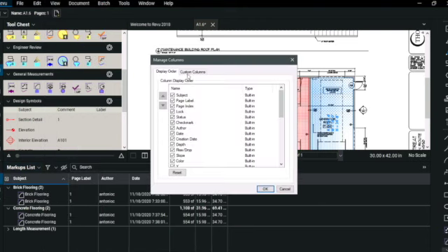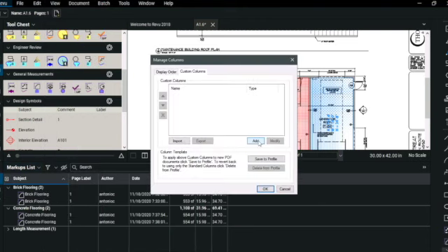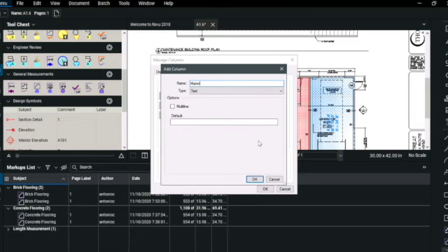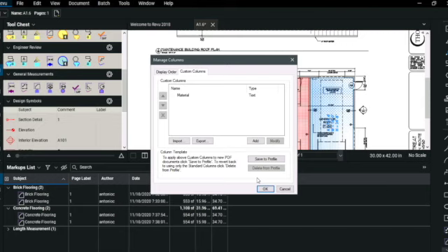I also created 2 new columns, a materials column to determine whether the flooring was made out of brick or epoxy, and a cost column to calculate the total cost based on the surface area and the cost of each material.